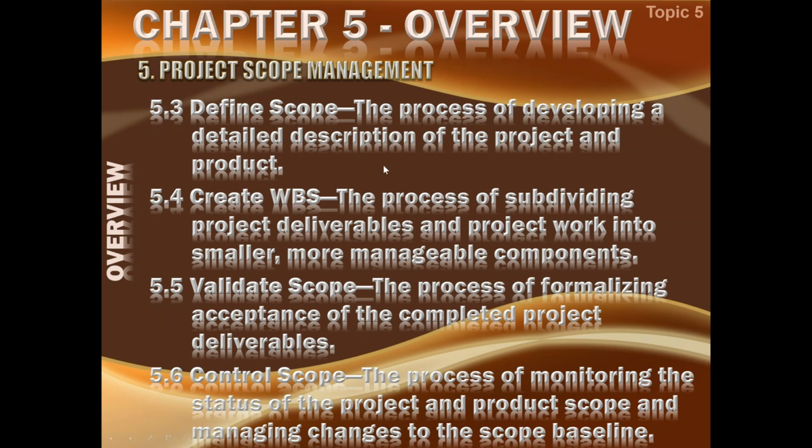Once the scope statement is created, then it is amply clear. We have already defined what is in scope and what is out of scope. This is now just the matter of explaining it and expanding it a little further, and through 5.4 create WBS, this process is for subdividing the project deliverables and project work into smaller, more manageable components, which we call work packages.